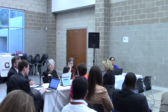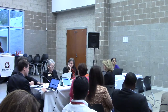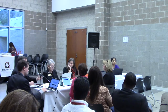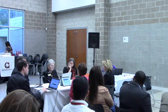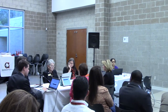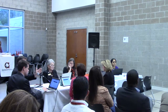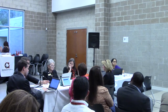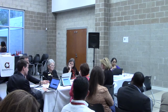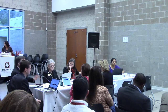So for us, we will have better numbers this spring once we have looked at that restriction of transfers, and then also who's coming, and we'll get our next glimpse of growth. By May, this late into the school year, we would have to start having real conversations about what's going to be the impact. And by the next school year, August, that's probably going to be our real decision-making point. We'll see that next group of growth that have just moved into the city. At that point we have to say, okay, it's time to go through the design process, or are we going to be able to accommodate it through the rezoning and the transfers?